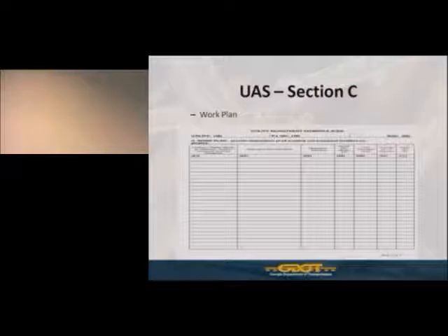Now, column 24 is the GDOT plan stage number. What that refers to is the actual stage number of GDOT's plans. In other words, if the department's project plans have multiple stages, then that stage should correlate with those stagings, not any sequence of operation or utility staging that you're performing. And then, of course, column 25 is the total estimated days for that various section of work to be completed. Columns 26 and 27 consist of the average number of workers you plan on putting on that various section of work and what day number you expect that work to begin in column 27.